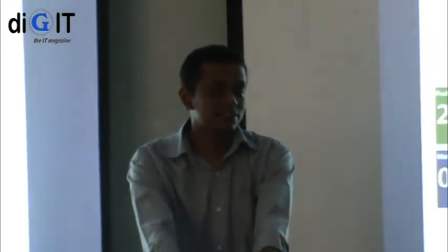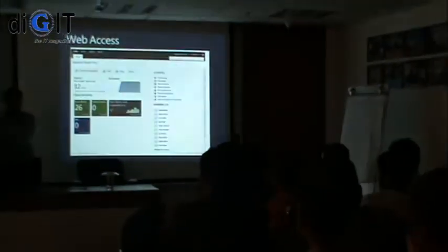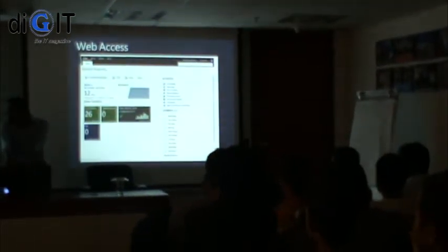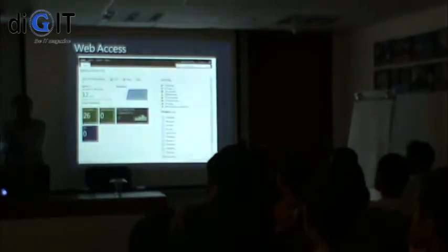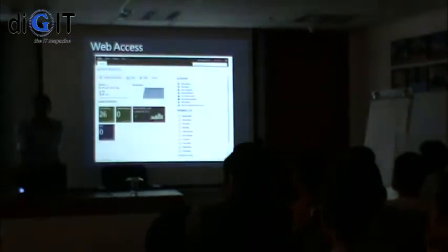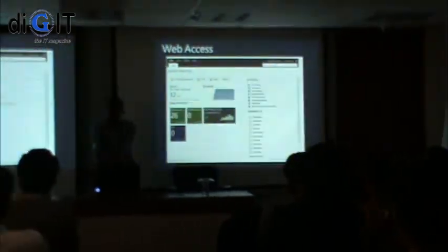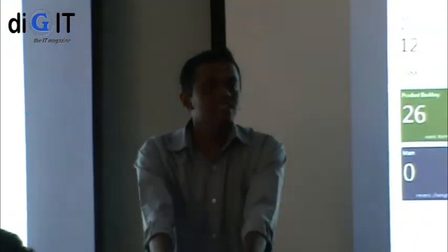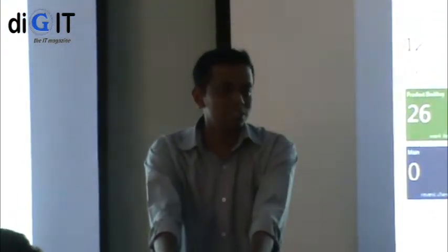Now, how to get this real end users' feedback? By dividing the whole development into increments, and by providing those increments for their feedback. Yeah, that's a very good idea. This is from a book, so don't worry about this that much. Yes, exactly. We should give them something that is working very early, not at the end of the project lifetime.